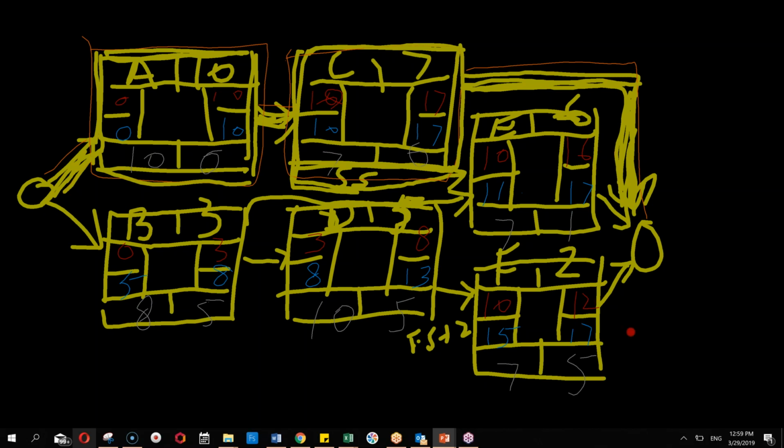And the important thing here is there will only be one path which will have 0, 0, 0 float. So the path is this one, A, C till end. At least there will be one path, and it will have 0 throughout. And this will be the longest path out of the many.